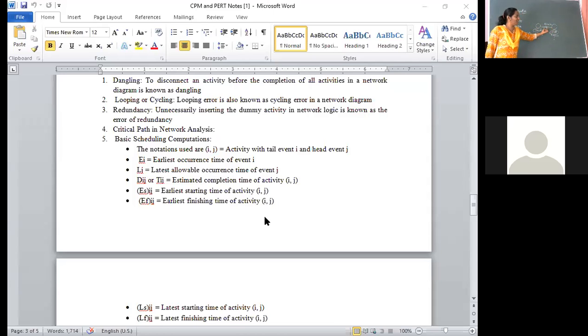Whatever the duration it will take, by bus it takes 15 minutes, is always represented by an arrow. That 15 minutes between start event and end event is nothing but the activity. Whatever the arrow, it represents an activity. Later we will discuss how many activities there are. First, we will study the three types of events.